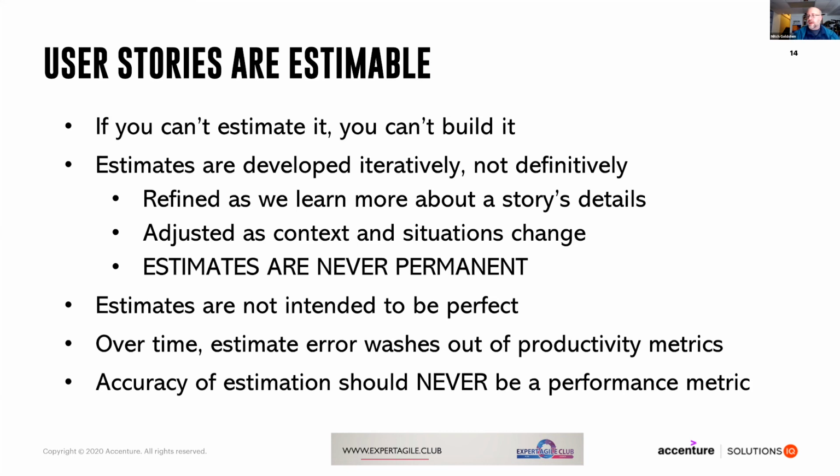As a matter of fact, it's kind of interesting to look back and see how well teams estimate. But I will say this, estimates are not intended to be perfect. And over time, the error in estimation washes out. And we have found this to be true over and over again. And the accuracy of estimation should never be a performance metric. And I say this most urgently.